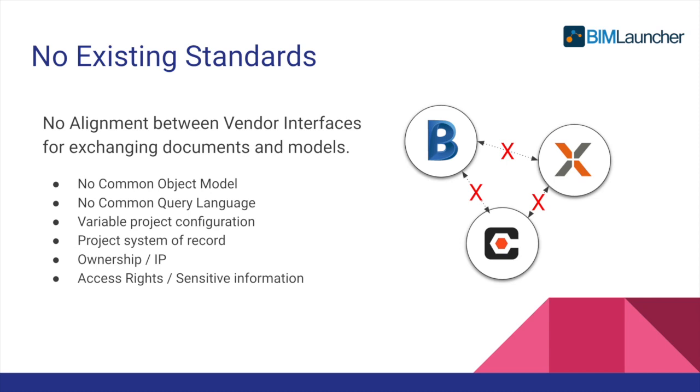For instance, in Aconex, you as the project information manager, ahead of project commencement, are given the flexibility to define custom metadata fields on a given document. That makes it even more difficult to create a single tool that can sit in the middle and be reused on every project. So you need to recreate that tool pretty much every time, or create some magical system that does it for you.